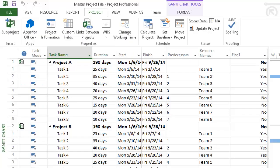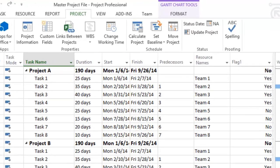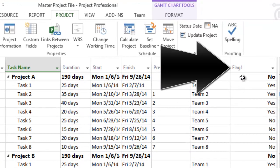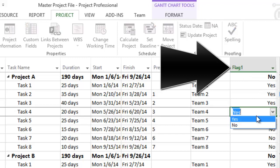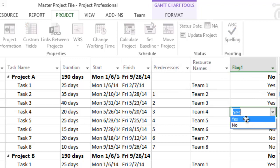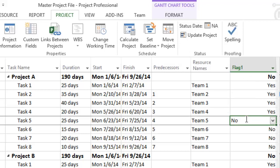To use OnePagerPro, we next need to select which individual tasks and milestones we want to import into the summary level timeline. We do this using a flag field, flag 1 in this example, where we have put a yes beside each task we want to be visible in the OnePager document.